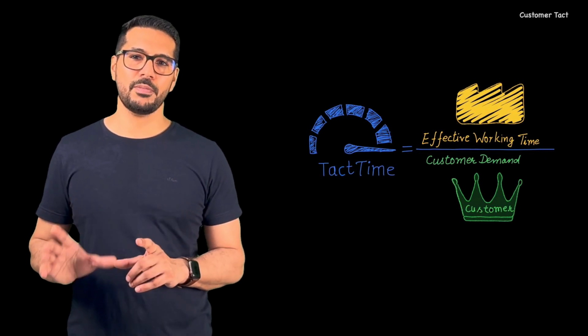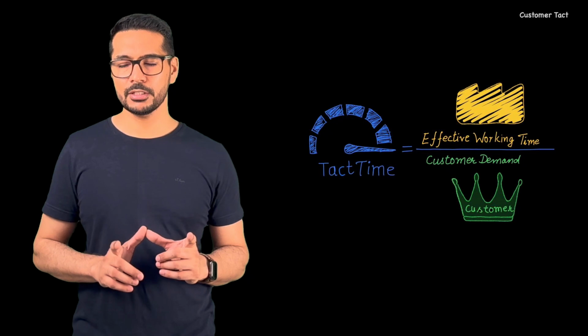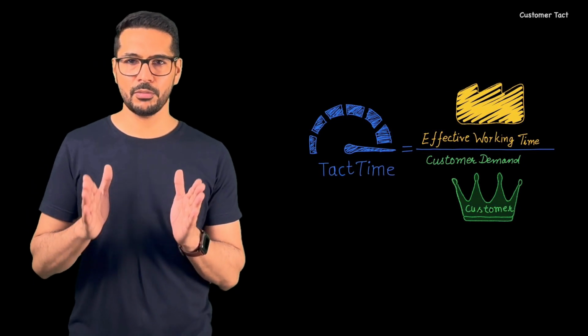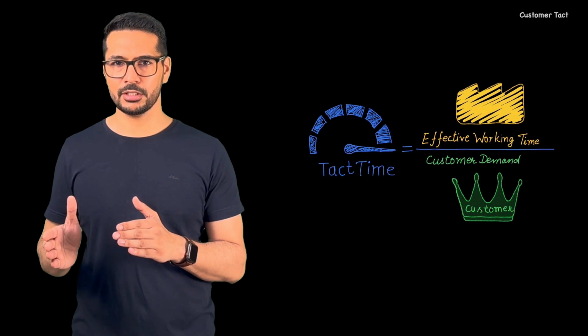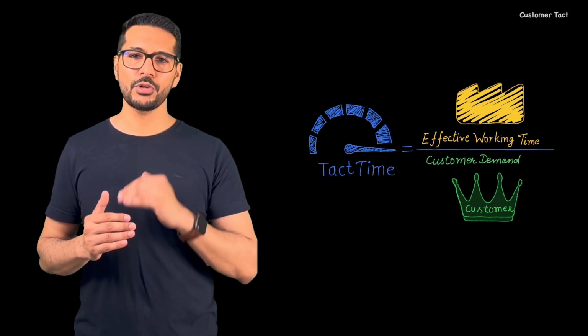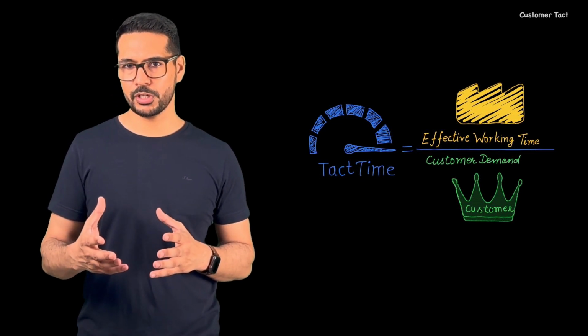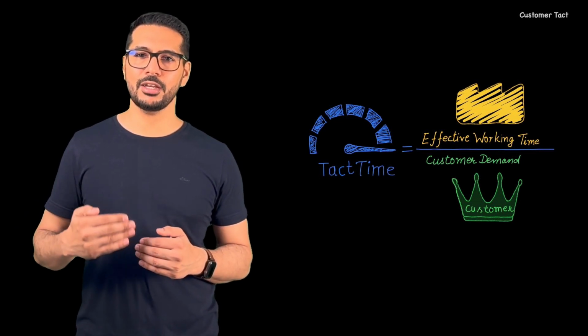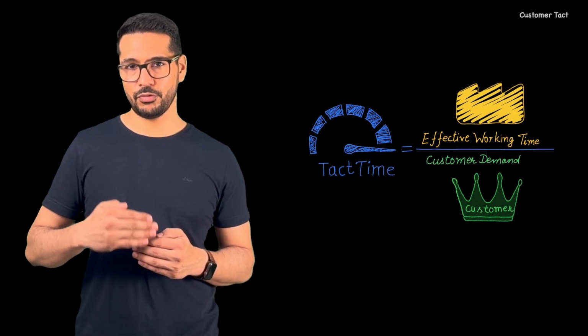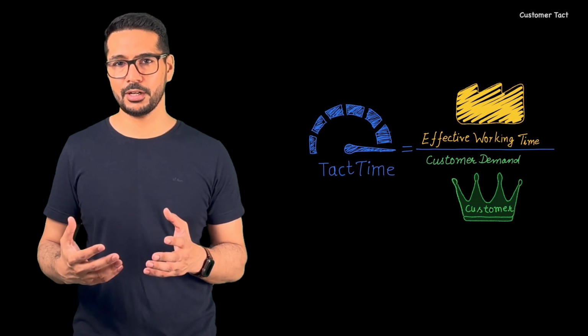Bringing the same concept to our office areas, we take a time frame of 1 month. Say in 1 month we have 20 working days, and in those 20 working days we have to deliver 2 projects. So it gives us 10 days: every 10 days we should be able to finish one project. This is the customer takt.